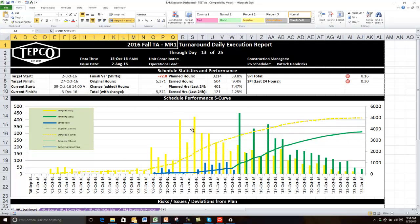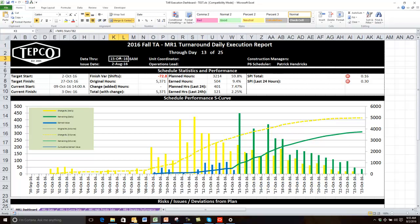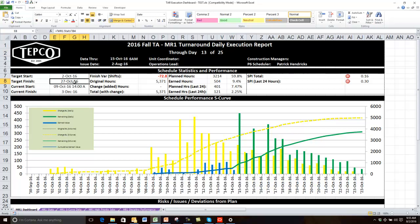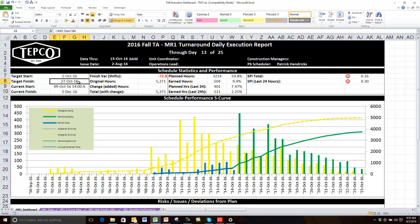Here I've got through day — you can see through day 13 of 25. This is referencing a cell, but it's also doing a formula. It's referencing K3 and going K3 minus E7. K3 is the data date from the MR1 stat sheet, and it is subtracting K3 from E7. E7 is the target start date, so basically it's counting the days from the target start date up to the data date. And this one is also a formula calculating E8 minus E7 — E8 being the target finish minus E7 — so the duration of this particular turnaround is 25 days.